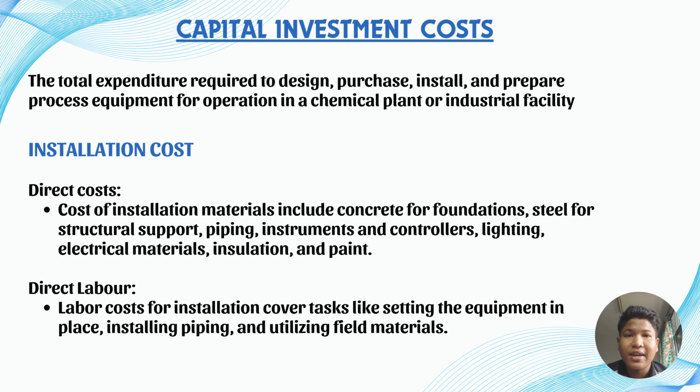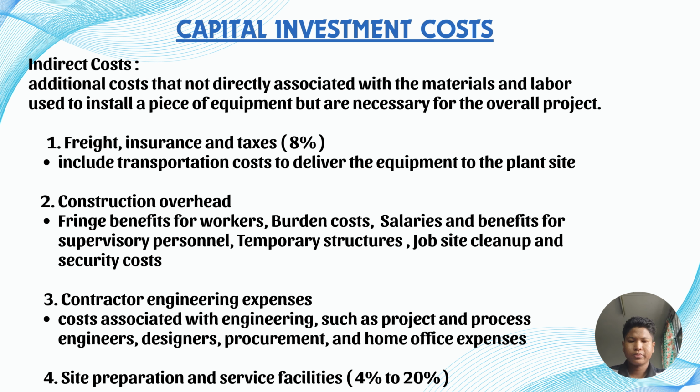Next, we have the direct labor, which is the human effort involved in the installation process. They include the laborers and technicians responsible for placing the equipment in the correct position, installing and connecting the piping, and also handling on-site fieldwork such as welding, cabling, and installation.